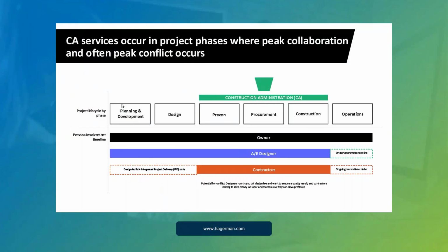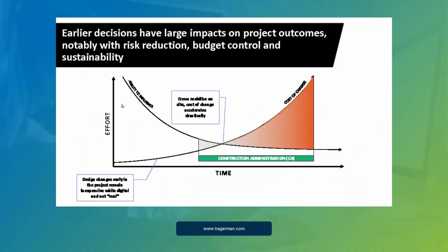Well, how do we eliminate the confusion? How do we eliminate misinformation? How do we eliminate costs related to all of this? Well, easily, the sooner we can make those decisions, the better. Because as we all know, once we get further along in a project under construction, the cost to make that change becomes exponentially higher, in some cases almost unviable. You just abandon the project sometimes.